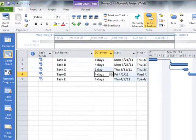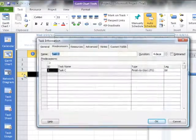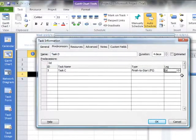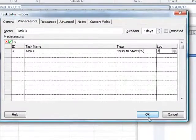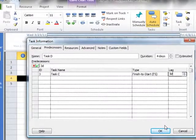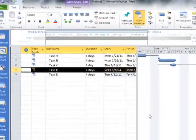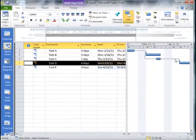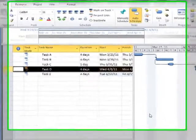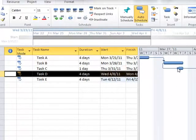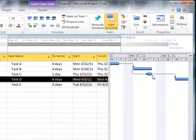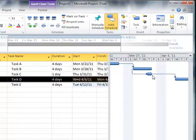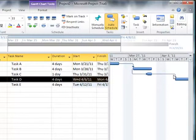We're going to change that to one day, and we're going to change this relationship between D and C so that there is this built-in lag time. In this case, we're going to say three days, because UPS and FedEx are not going to be delivering on Saturday or Sunday or moving the package around. So we need actual three working days in here. Notice what has changed and why this is a much more realistic view of our project now. If we had four days of work assigned to Task C, we're going to be allocating resources during those entire four days. But instead, we know that our resources only need to be allocated during that first day, and the subsequent days, we really don't have any resources devoted to this particular task.